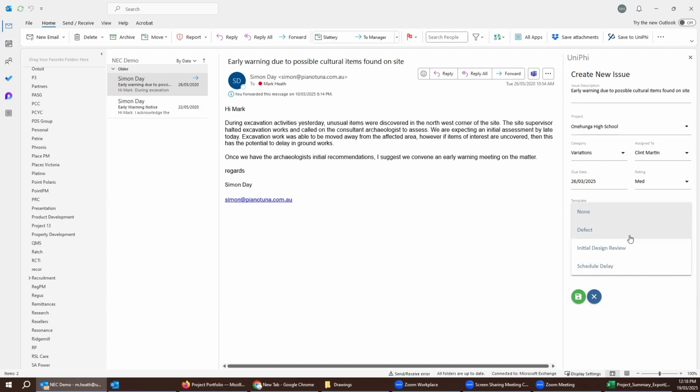So we've got, for example, a lot of NEC-related projects we're pitching into the UK at the moment, where we've developed standard NEC responses for early warnings or compensation events and things that are related to that contract, where they have a certain number of days from the raising of an early warning to respond, to set up a workshop, to then do something else and do something else. And it sets up all of those actions automatically for you. So these are workflows that are configured into the system.